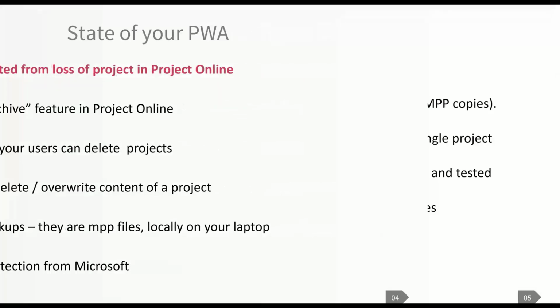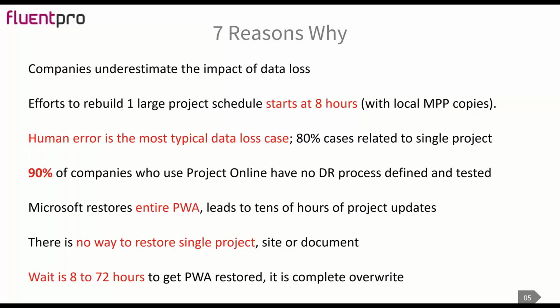Many companies do not realize it, and they underestimate the impact of data loss. It takes at least 8 hours to rebuild a large project, even more. We've seen several customers who spent days and weeks rebuilding the schedule. Imagine that you have a project with several thousand tasks and your latest backup is from a month ago. It's a large project, and it will take you days and weeks to restore it and make sure everything is up to date.